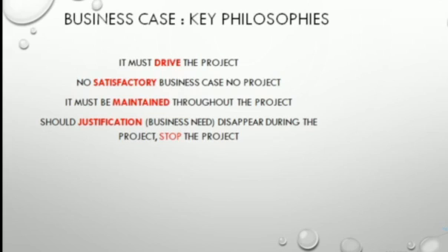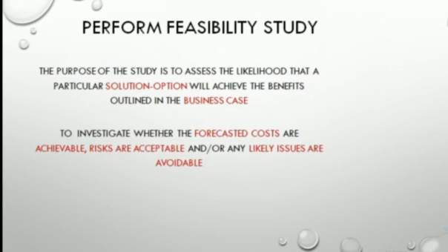Now, the next is that you perform a feasibility study. The purpose of the study is to assess the likelihood that the particular solution option will achieve the benefit outlined in this business case. Now, this project option that you have chosen to tackle this problem, will it actually give you the desired benefits? This is what the feasibility study is talking about. You have to assess if it will actually give you the desired benefit, the desired objective of that project, of that problem that you want to solve.